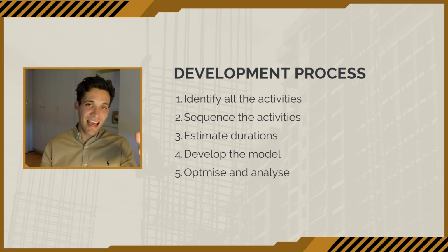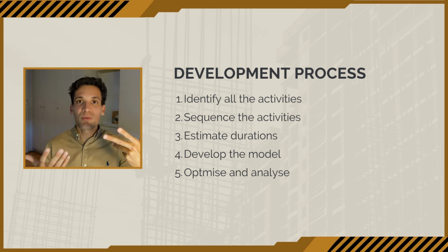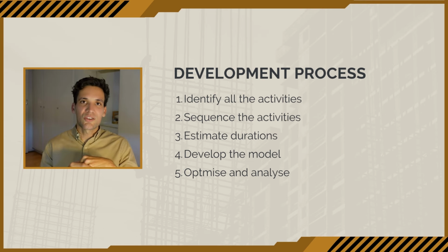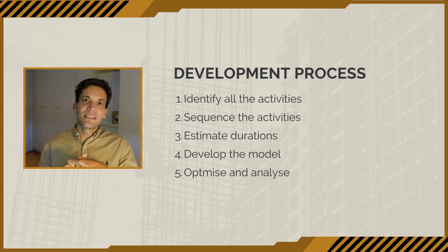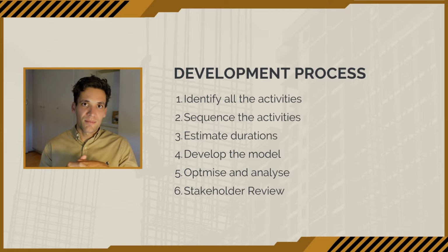We then need to optimize and analyze this. We need to make sure that the model we've created isn't going to violate any constraints. So does it actually show we're going to finish the project on time? And then we need to get stakeholder review and buy-in. However, if we build a plan and do nothing with it, all we've done is waste our time. The only value a plan has is if it's followed.